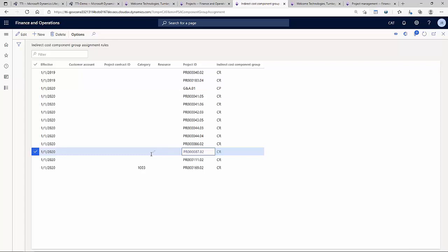So specifying these categories under this project are going to be cost reimbursable. Perfect. The system will calculate indirect cost only on top of those categories, right? In this scenario, what I'm saying is everything that we post against this project is going to be subject to indirect cost. That's how I can leave it open as it is, right? So everything that I'm posting to that project is by definition allowable, right?